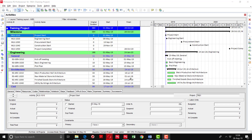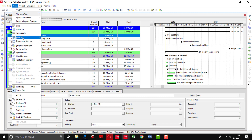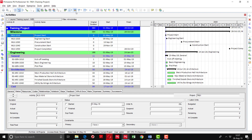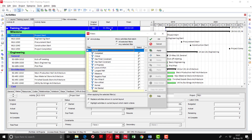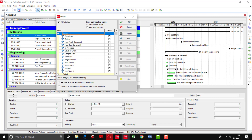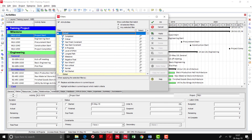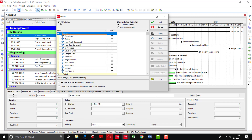I will tell you how to use the filter feature. To go to the filter options, there are two ways: either go to the View toolbar, expand all, and you can see 'Filter By' — either click on this one, or choose this toolbar 'Filter By'. The filter window has been opened. You can see that right now all activities are displayed in the project. When you open a project, you should check whether any filter is applied or not. You should select 'All Activities' when viewing any schedule.